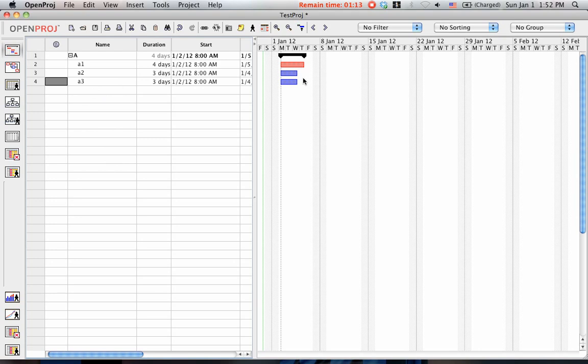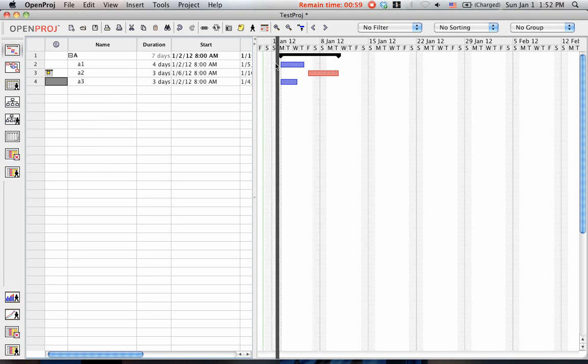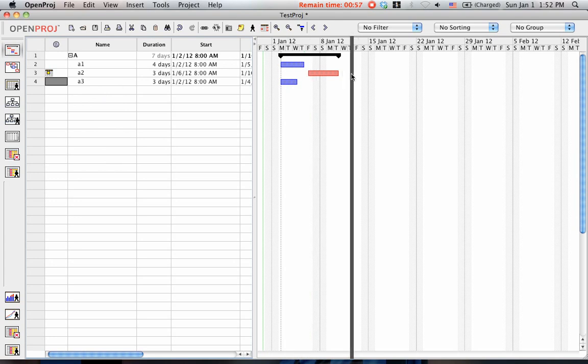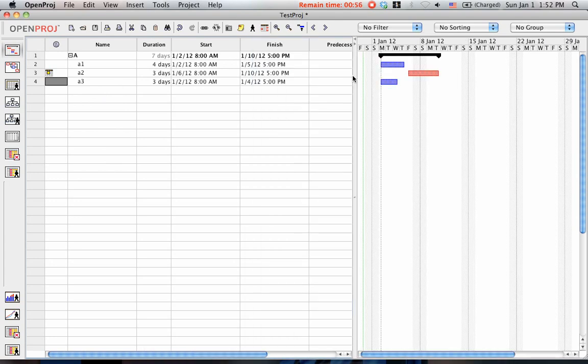Now I have these three tasks under A, and as you can see here, I can move the task on the Gantt chart, and the dates will change automatically. Let me slide this over here so you can see the start and the finish date.